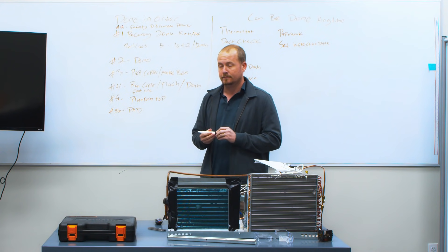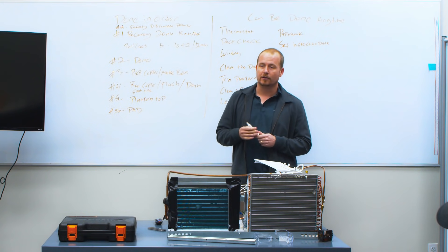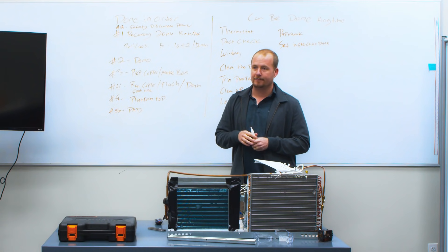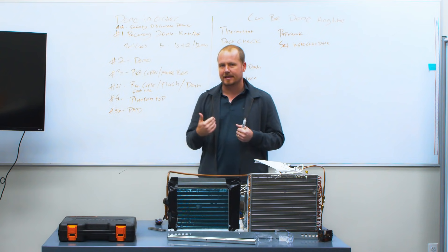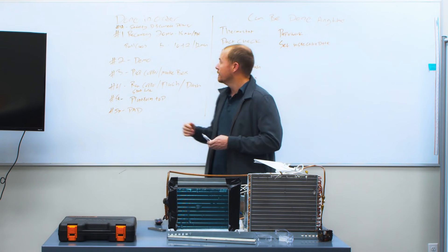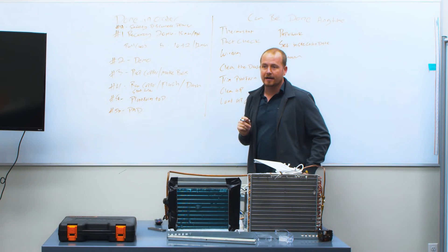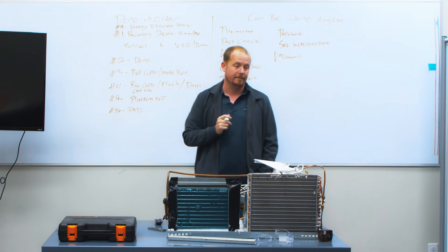Making sure you have a completely tight system is critical. Do your recovery as quickly as possible, pull your vacuum as quickly as possible. Why do some people feel like vacuum doesn't need to be pulled quickly? The biggest excuse I hear for not using large hoses or pulling cores on change-outs is that if you let it sit for an hour or an hour and a half, it'll probably pull down fine anyway. But if vacuum goes on the non-critical side — where it can be done anytime — you want to know if there's a problem sooner.